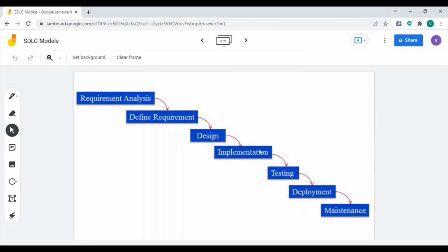Suppose in the IT industry they are in the development phase. They are writing the code for the given SRS document. Now, if the customer wants to add or update some requirement, he cannot do it, because the SRS document phase has already been completed. It has been frozen, so I can't go back. I have to start again from the beginning and do the rework. That is one of the risks. It is a risky factor. Also, it is a time waste factor, right? We are doing a lot of overwork, redo work, rather than concentrating on the end product.